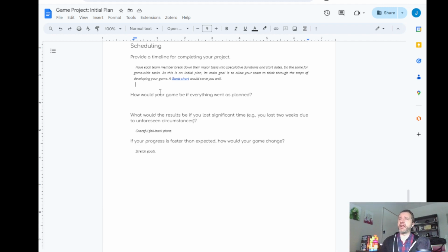So we'll give you a bit of that. How would your game be if everything went as planned? What result if you lost time? What would your game results be if you lost significant time, like you lost 2 weeks? Maybe your producer got sick, or perhaps you had a really stressful time and needed a mental health break. What are your graceful fallback options for the game and design?